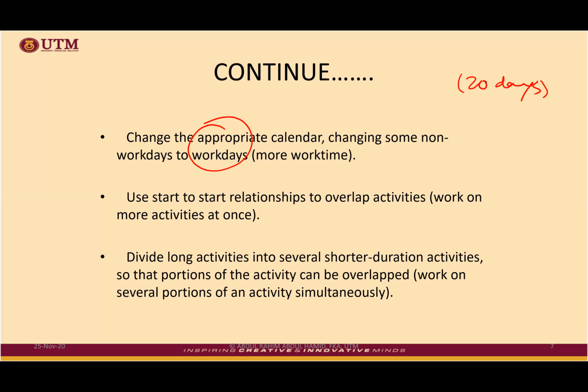And then you need to pay more, double or triple time. So it is not necessary. So sometimes because of all those holidays taken into account, your project will take not only 20 days, but could be 30 days. But the real work for the project remains 20 days, except the other days could be holidays.